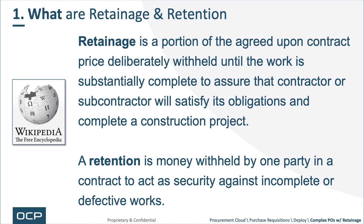Retainage is a portion of the agreed upon contract price deliberately held back until the work is substantially complete, to assure that the contractor or subcontractor will satisfy their obligations. You see this a lot in construction and architectural engineering. Retention is money withheld by one party in a contract to act as security against incomplete or defective works.